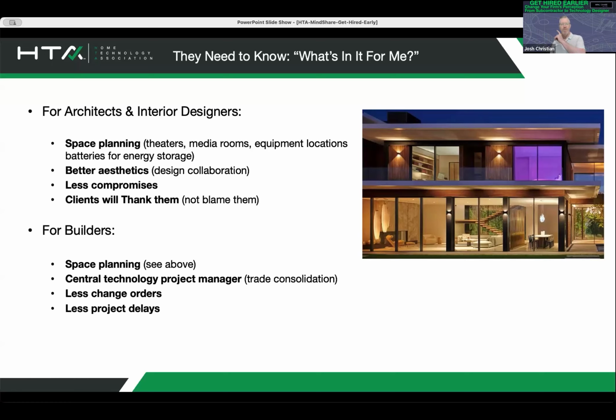Because if you don't do the design for them first, there's going to be change orders, right? The electrician's going to have to add things later, and maybe have to reframe certain things to hide pockets and such. So to say, even if the architect gives you the plans and the low voltage has not been accounted for, which is usually the case, get me involved first.